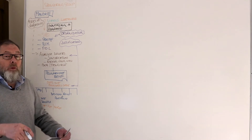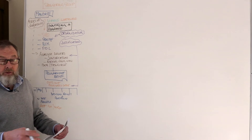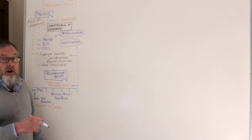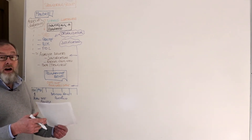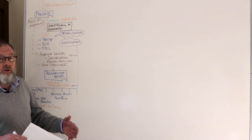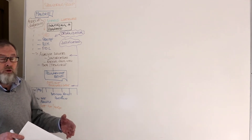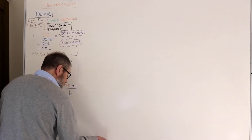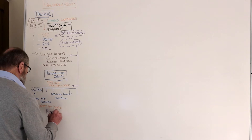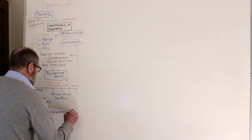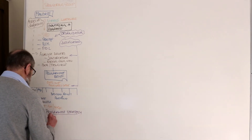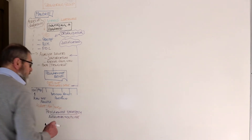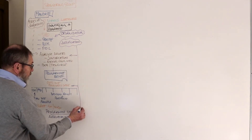At the same time, we may be starting to put the rest of the governance strategy together through the other themes and approaches. We may have some decision themes going on, we have major risks in the business case, so we may well have a risk register up and running already, and the approach to how we handle risk. From an assurance point of view, if it's a very sensitive or risky-natured program, you'd have assurance in place at that level too.